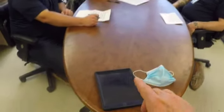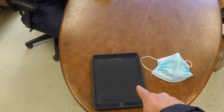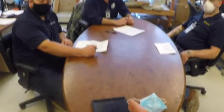There's a lot to be said about daily huddles, and as a company, Berglund Construction Company, moving into 2021, we're starting to recognize a pattern. That pattern is that our superintendents have not been using Procore for their daily huddles, and they've been doing them verbally. If we don't have documentation of a daily huddle and something today goes wrong, I have nothing to refer to on a legal side in court. This becomes a legal document.